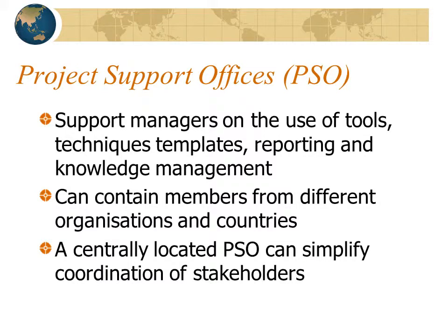The second main category of project offices is project support offices, or PSOs. A PSO supports managers on the use of tools, techniques, templates, reporting, and knowledge management for a project. A PSO can contain members from different organizations and countries, and this format could assist in aligning the processes, tools, methods, and templates of the different parties involved in the project. A centrally located PSO can also simplify the coordination of stakeholders, particularly if that's located in a central regional time zone.